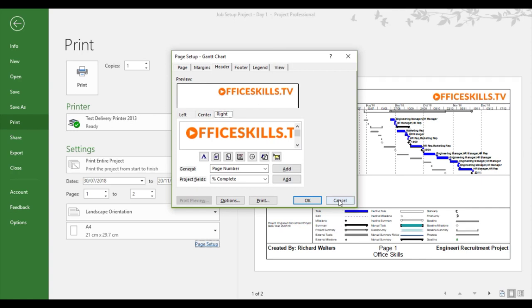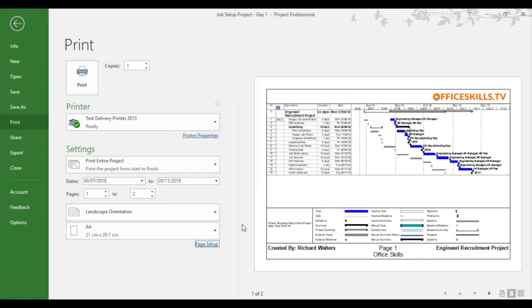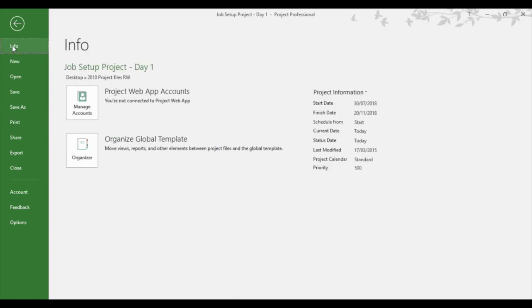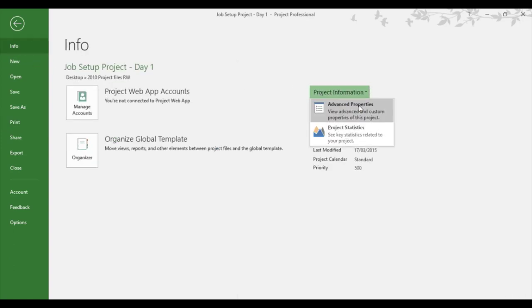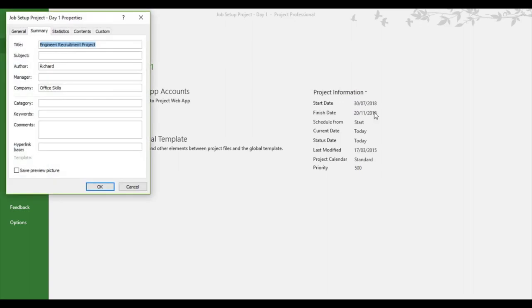If I now show you about properties and how you can get things like project title and company name put in. That's under the info section within project. So in the same areas as print, if you look up a little bit, there's info. Underneath there, there's project information. We can go through advanced properties.